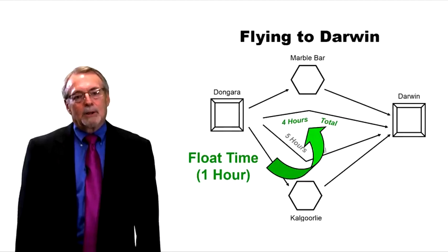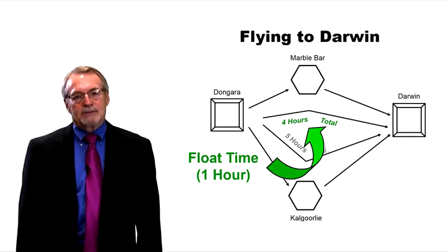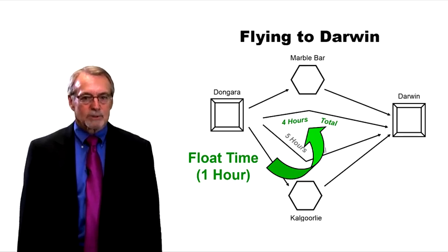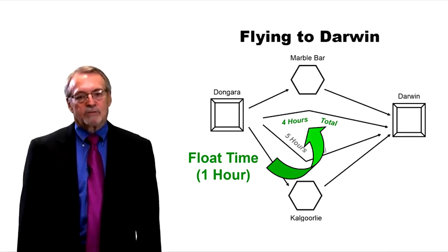For example, we start to land in Marble Bar, bang, tire blows out. It's going to take 45 minutes to put the tire on. We can't load the parts and supplies while the tire is being put on. So now this route is going to take 4 hours and 45 minutes. Well, we had to pay for the tire, yes. Risks will almost always cost you more money on the project because there's usually extra tasks and sometimes more materials. Doesn't have to mean your project's going to come in late. This route now takes 4 hours and 45 minutes. Our project still comes in just fine.